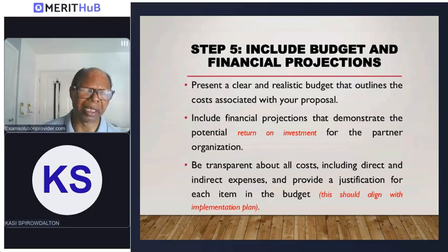And then if your plan is for 3 years, then you multiply by 3. So that will give you a total budget for only that staff, the 2 dentists. Then if you're going to have a care assistant, again, you do the same. How much a care assistant is going to get in a month, and then multiply by 12, and then multiply by 3 for 3 years to fit that project proposal.